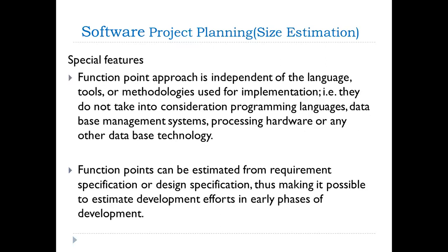So what are the special features of function point analysis? The function point approach is independent of any language. We can say that we are using C, C++ or Java. Any kind of language, any kind of tools and methodology can be used for implementing the project. It does not take into consideration the programming language, database management systems, processing hardware, or any other database technology. That is the first feature. Second feature: function points can be estimated from the requirement specifications or design specifications.